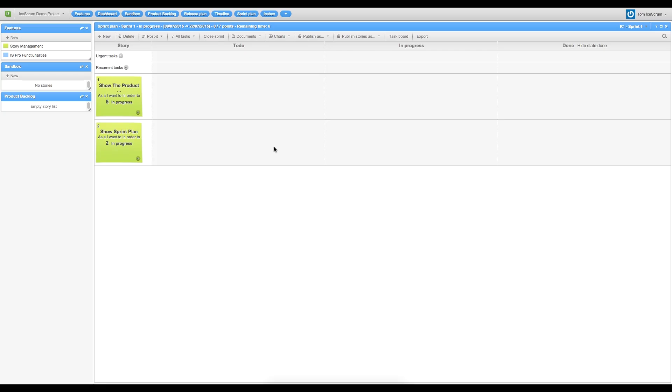How to create new tasks. This is the sprint plan view. It's composed of different kinds of tasks. The usual tasks are not associated to any story. The recurrent tasks are to do every sprint. And here, these are the two stories attached to this sprint earlier.